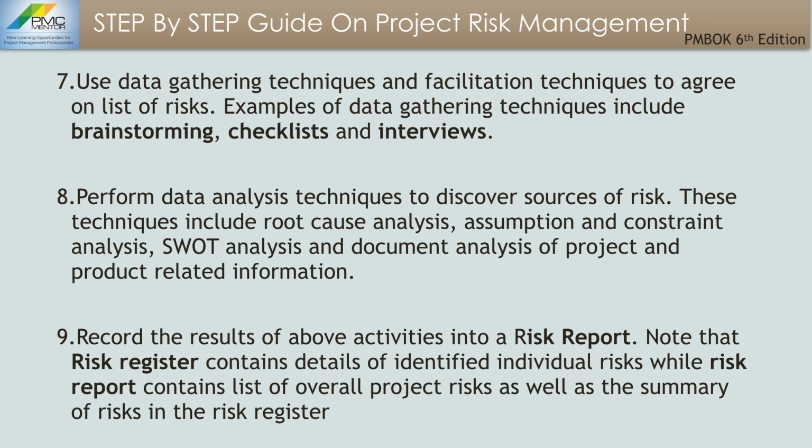Note that a risk register contains details of identified individual risks, while a risk report contains a list of overall project risk as well as the summary of risks in the risk register. And this is important from the exam standpoint.